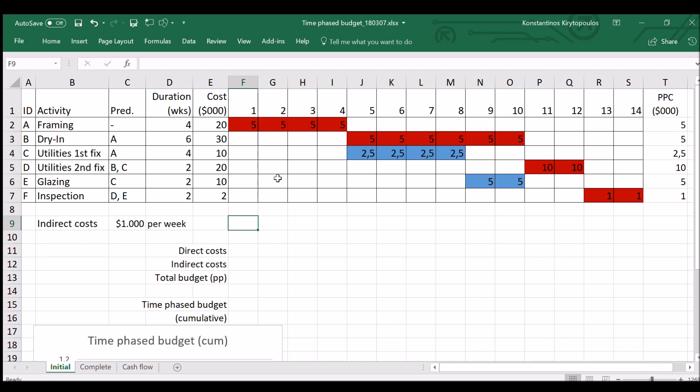answering the calls for the project. Or it might be the consumption, the cost of the consumption of power and water for the work site. So these costs cannot be directly attributed to a specific activity, and that's why they're called indirect.